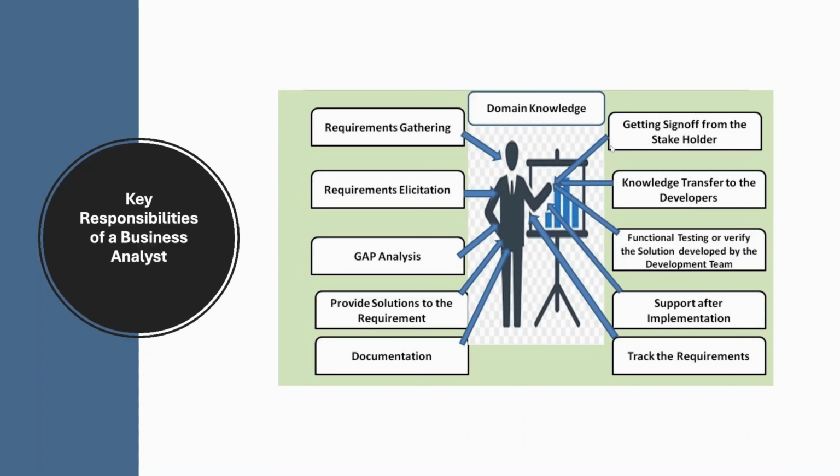Basically, once a requirement is gathered from the stakeholder, the business analyst has to make sure that this requirement is mentioned in the FRD, that is the functional requirement document, and the stakeholder has to give a thumbs up and go ahead that this requirement is written properly, and this is what I want. Post the sign off is issued from the stakeholder,